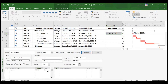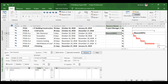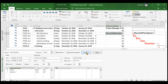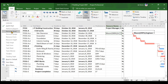Since this is a fixed duration activity, the duration has not changed after doubling the units — work has doubled but duration stays the same. Two masons will work for two days, each day being 10 hours, giving 40 hours of total work. We also add engineer one. No equipment resources are required, but we created some cost resources — traveling, insurance, BG, and clearance — which we will briefly demonstrate.